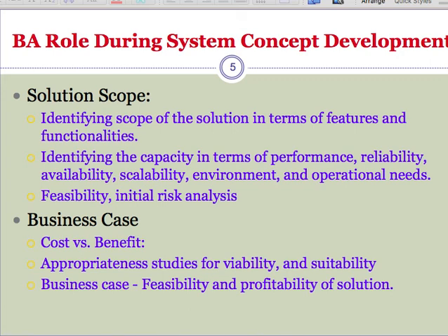The most important thing in business is that when you are investing, especially in IT related investment, they expect the return or the break even in maybe 18 to 24 months. Okay, so for example, if you are investing $100, you must generate $100 within 18 to 24 months, and beyond that it should be a profit. So that's the break even. It could be X amount of investment, but you must start getting the return at least after 18 to 24 months. That is basically how the calculations are done.